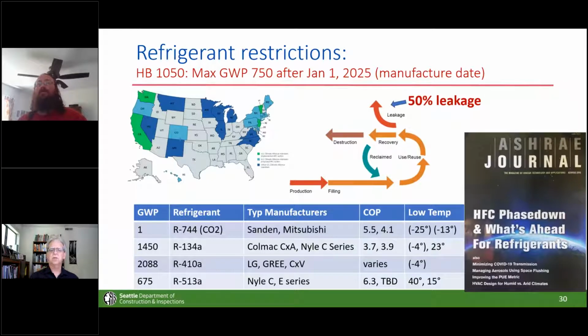They were coming in at an extra $700–800 per apartment unit more than the traditional heating, whereas the R134A things that sit in the basement were coming in at more than double that additional cost. So it might be that the low global warming potential refrigerants are also your economical path for water heating.